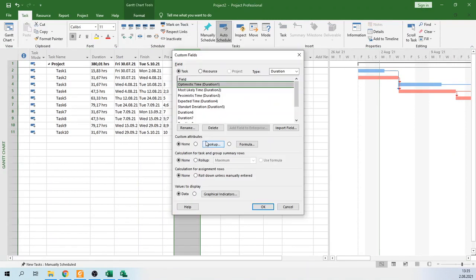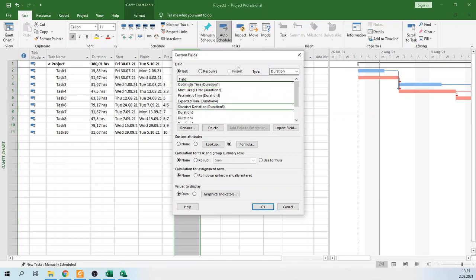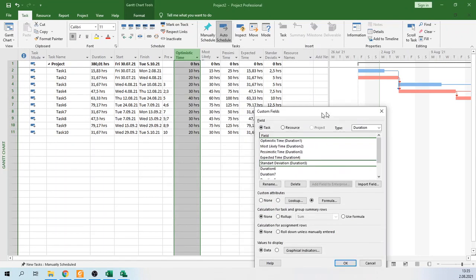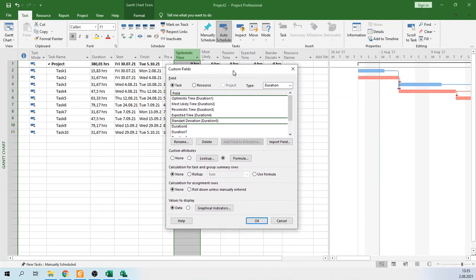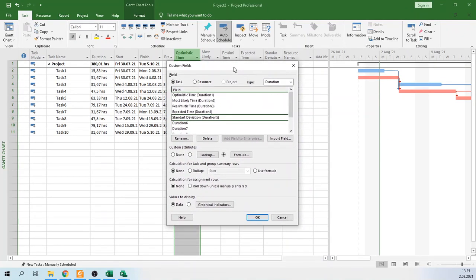You should change all the names: optimistic time, most likely time, pessimistic time, expected time, and standard deviation. Now you have changed the names.